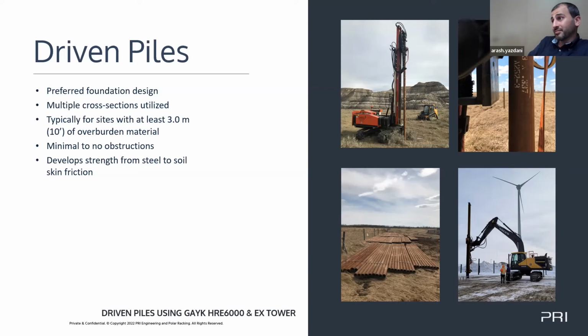It's tough. As a construction contractor, we're pulling our hair out. It just hurts morale on the site. Everyone hates their lives and hates the job. If the foundation works with the geology, it's a happy, sunny day site, right? You can just feel it, you can sense it when you're out there. So proper engineering all starts right from the beginning: the preliminary site testing, the desktop study, geotechnical investigation, the pile load testing, and then the procurement. It's in that order. That's exactly what should happen to evaluate the site and evaluate your options.